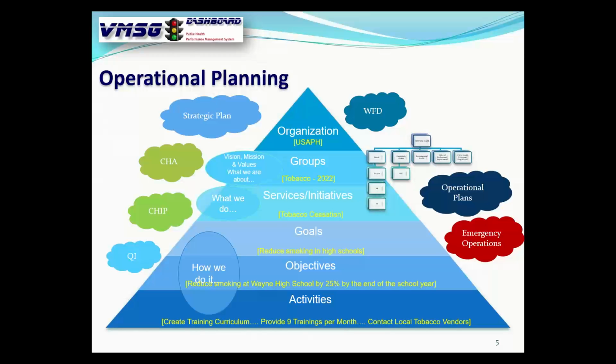You start out and say, okay, what are the big buckets? What are the groups? Maybe it'll all be under one group, or under that group, what are the big buckets of things that we're going to provide? What are the services that community health provides? What are the services that emergency operations provides? That sort of thing. And just build the plan out till you get down to those specific activities.